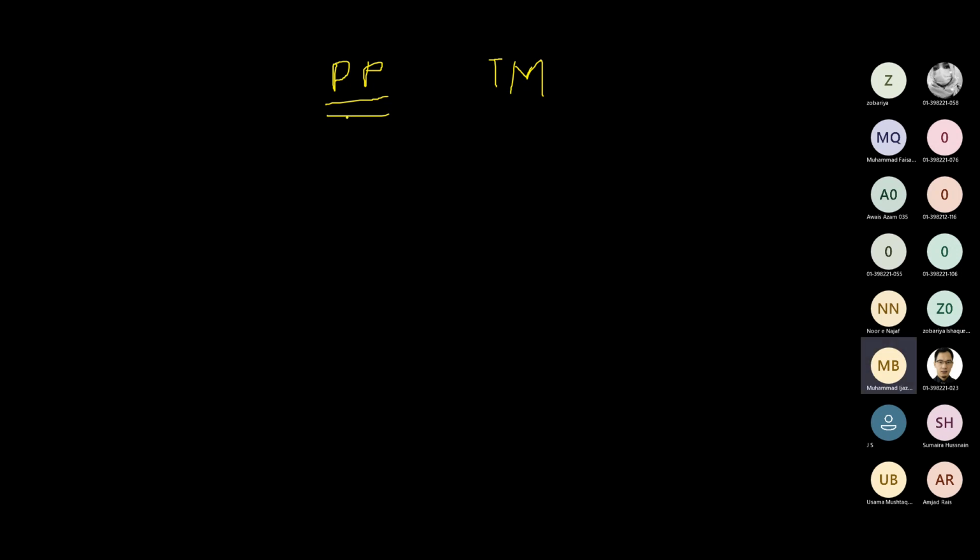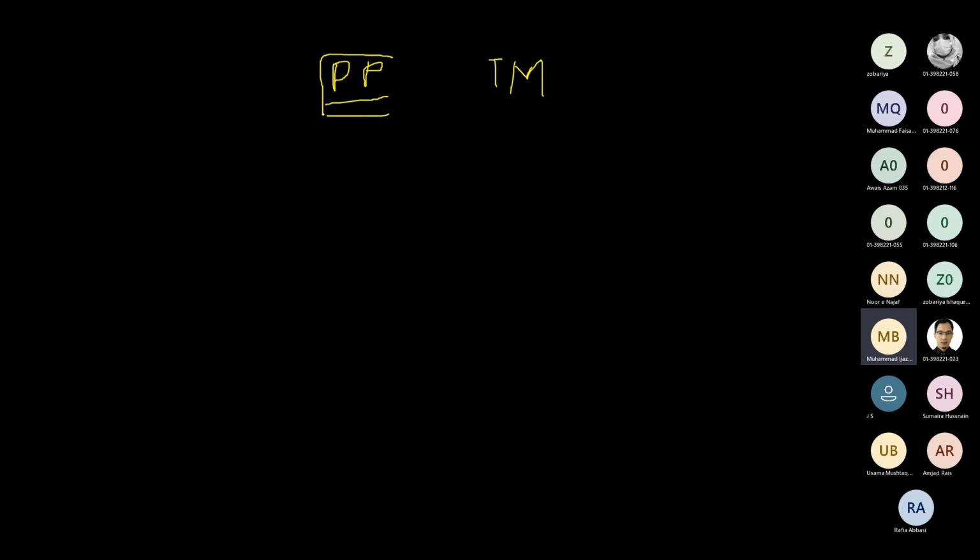After that, we saw that while planning a project, we perform planning at various stages. The first level of planning is pre-project planning, right? In that, we check the feasibility of the project, why a project is being started, and the various alternatives that are discussed to start a project, what its high-level objectives are. Then, based on our feasibility study and assessment, we choose one of the alternatives, and we take that as a project.